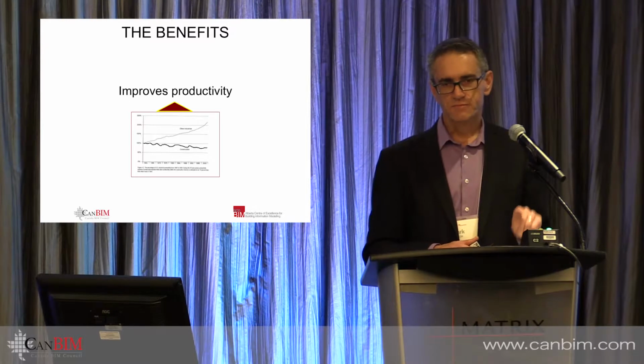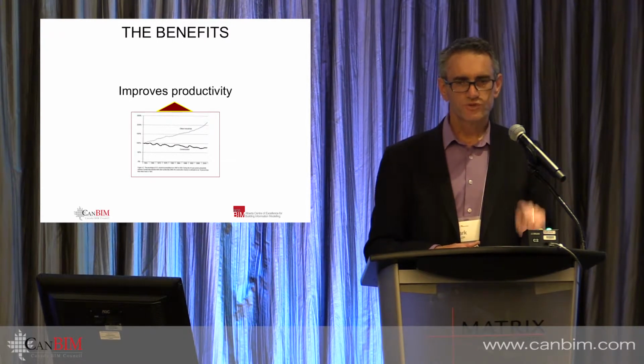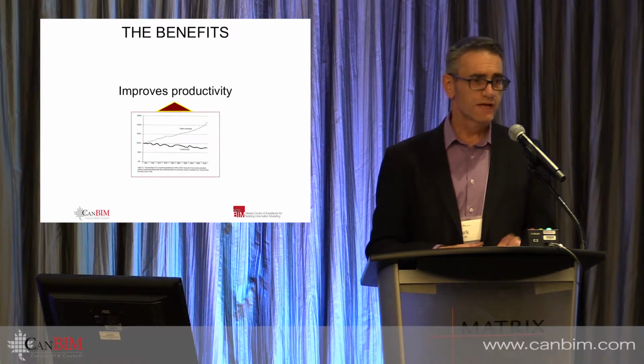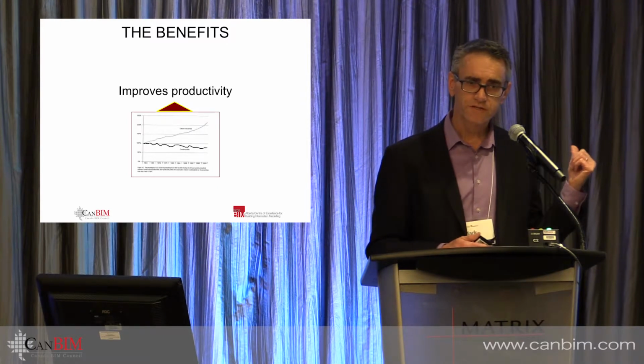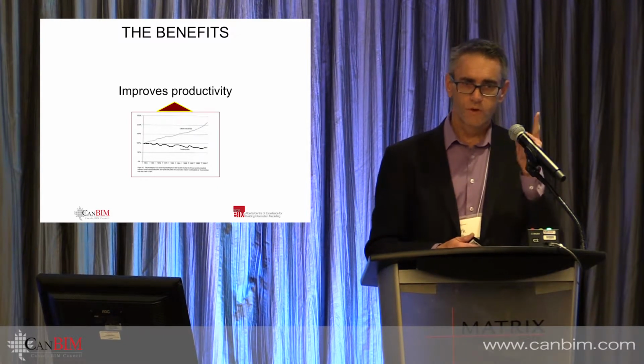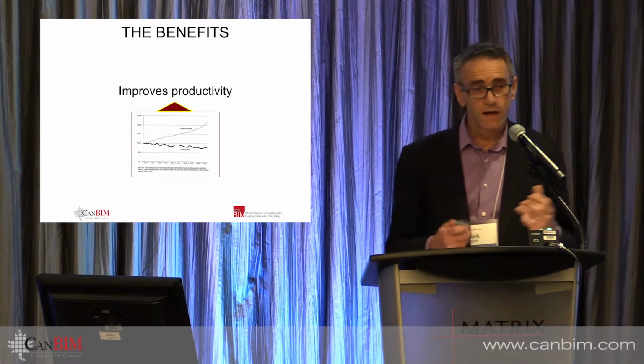And even they were amazed because they suddenly realized that because they were working with other trades, they could do so much more with their prefab. The electrician was over a 60% savings in the man hours required. All 360 bathrooms in 3 months, 1 electrician.